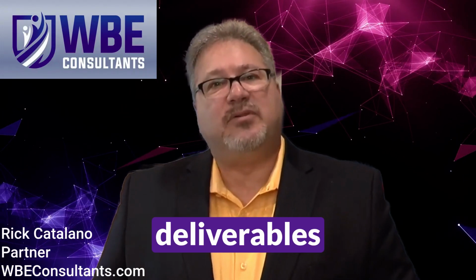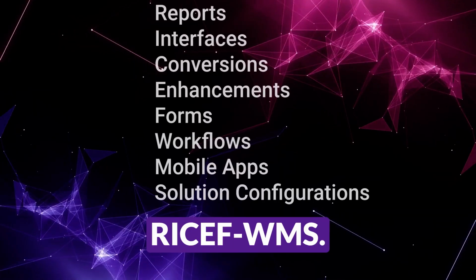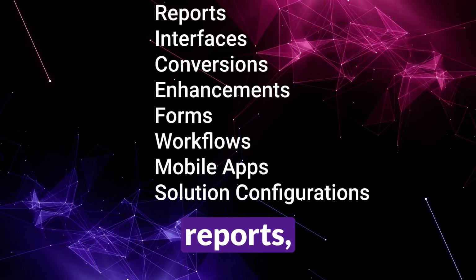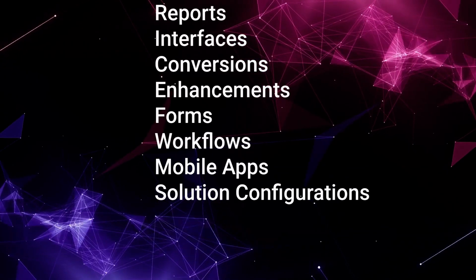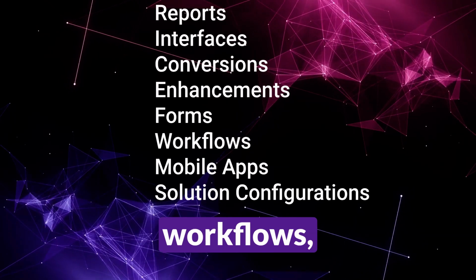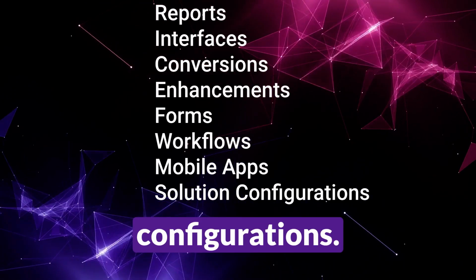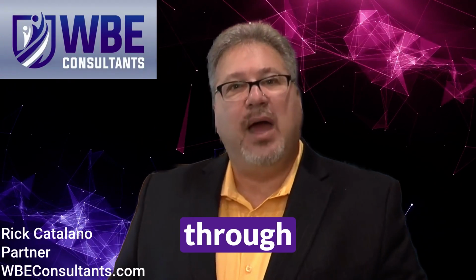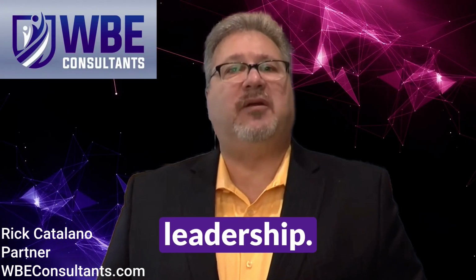The types of deliverables or things that I'm talking about here follow an acronym that I refer to as RICEF-WMS. RICEF-WMS stands for reports, interfaces or integrations, conversions, enhancements, forms, workflows, mobility apps or applications, or solution configurations. By thinking through this acronym, I have my team start thinking through how they're going to best measure the benefits we promise to deliver to our leadership.